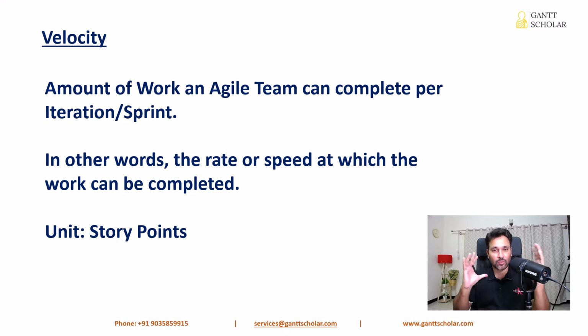We take the total amount of work we have in the product backlog and we use the team velocity to find out how many iterations or how much time period we need to complete all the work we have in the product backlog. So velocity is the basic input we need to calculate the project schedule in Agile projects where